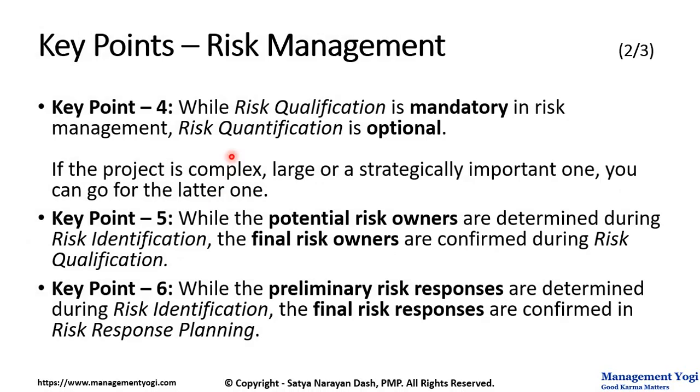Key point 4. While risk qualification is mandatory, risk quantification is optional. If the project is complex, large, or a strategically important project, you can go for risk quantification.